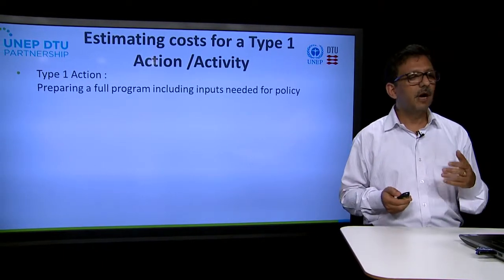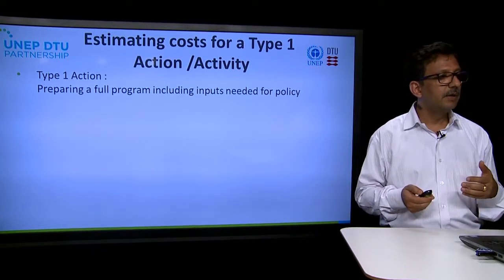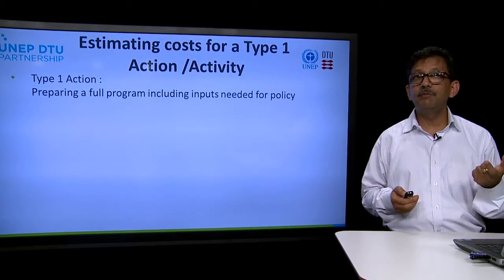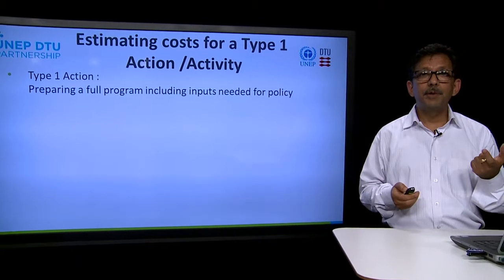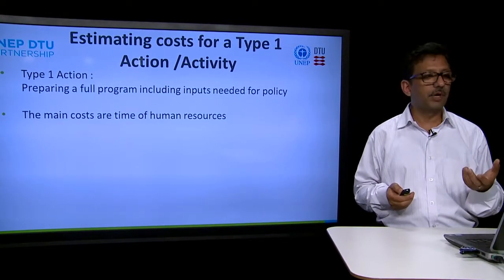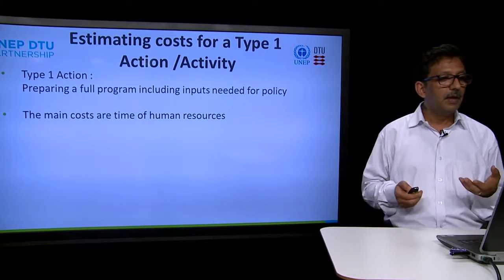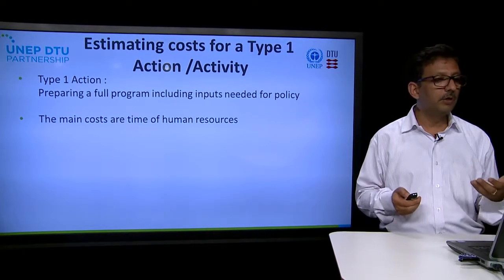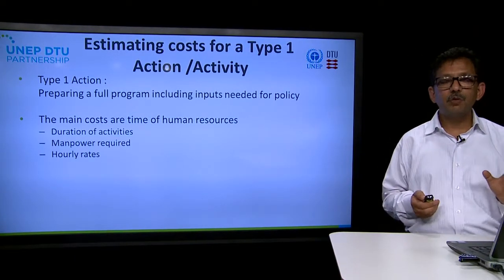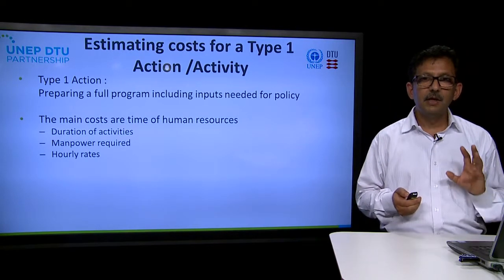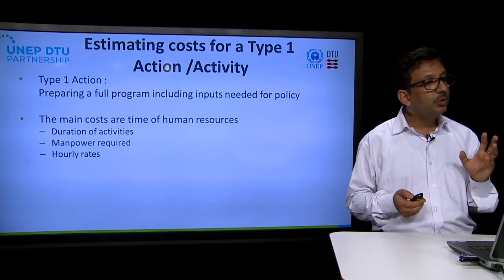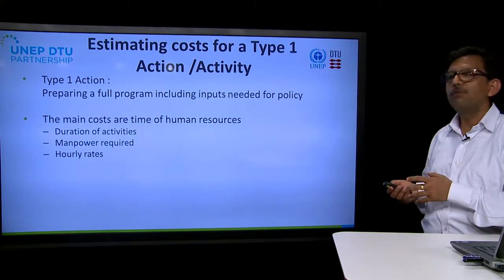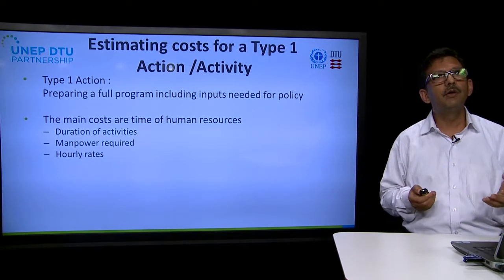Let us look at how to estimate the cost of type 1 activities. Type 1 activities are those where we are talking about preparing a full program, not the implementation of that activity. Therefore, the main cost for such actions and activities is human resources. When we talk of human resources, we have to think about three things: the duration of activities, the manpower required for those activities, and the hourly rates, because these will vary from country to country.